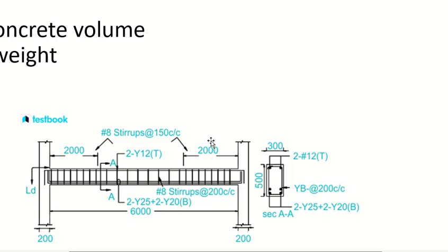In terms of quantity, it can work, no problem. For quantity calculation, it can work. Design of beam will not work like this. If somebody says do the design of the beam and you say my beam is this, it will be wrong. Your beam is from here to here. This is part of the beam, this is part of the beam. In quantity, it can work, I can take a beam from here to here.